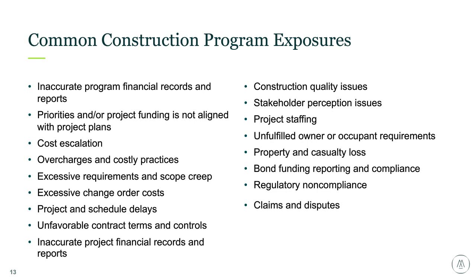Okay, so I will go through a few just to add some additional notes. The first one, inaccurate program financial records and reports. I often see instances where the facilities development group knows the real project schedule, and this may significantly differ from what stakeholders and end users are expecting. This discrepancy can cause major operational disruptions and financial issues.